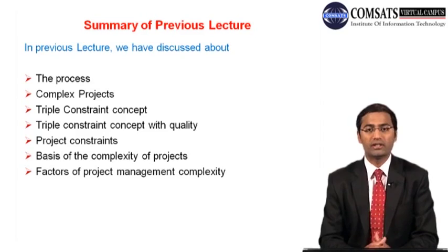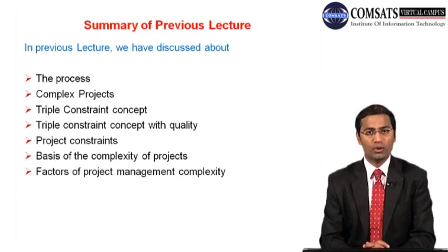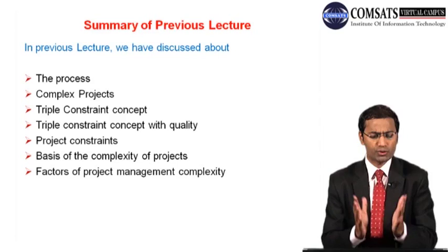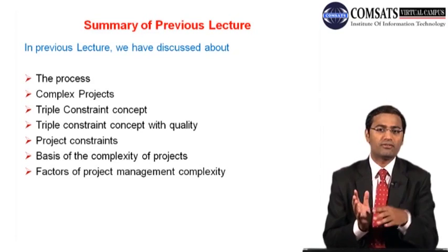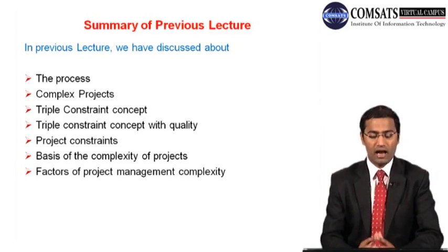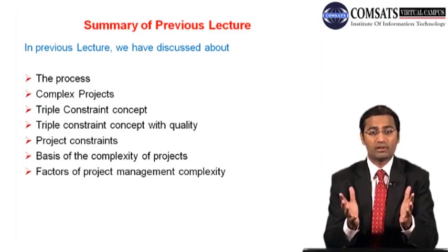Besides that, we noticed that if your company has experience of doing the same project, the complexity level is quite low. But if your company is entering a business of this type of projects, which is very new to the company, and the organizational process assets are not available for that particular type of project, then even a simple project will be complex for that organization. So a simple project for one person may be a complex project for another, and a simple project for one organization may be very complex for another organization. Take a very good example: building a nuclear plant may be a lesser complex project for the USA, but it would be a very complex project as far as Iran is concerned.